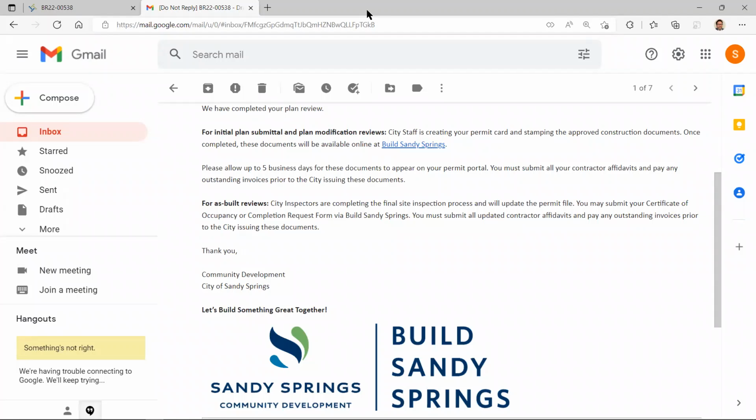Residential, usually 3, 4, probably just because the drawings are not coordinated. There's so many discrepancies in residential drawings because it's not a licensed architect and they're not talking to their structural engineer. It's a drafter or a residential designer, and then somebody else hired a structural engineer. So there's no dialogue back and forth between your design professionals. And that's the difference between residential versus commercial, usually. It's not always the case, all right? But usually that's what goes on.